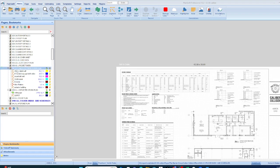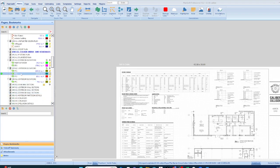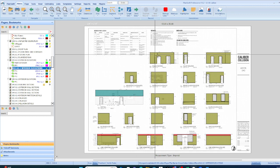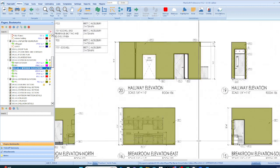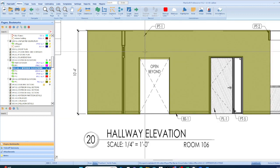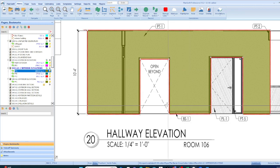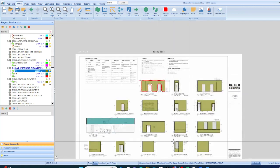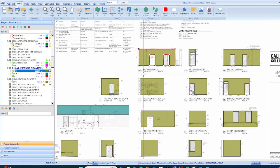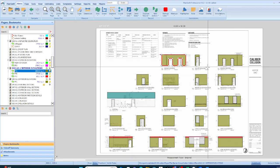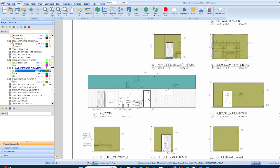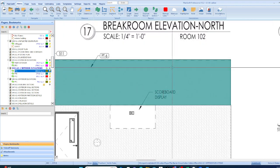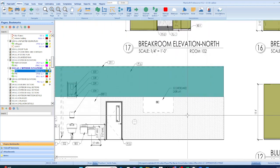I prefer a good set of plans is going to give you interior elevation. And from the interior elevations, you can just produce your numbers. And a good set of plans is going to give you an interior elevation for each of the rooms. So that way, you'll know the finish PT6, you know what parts not painted.